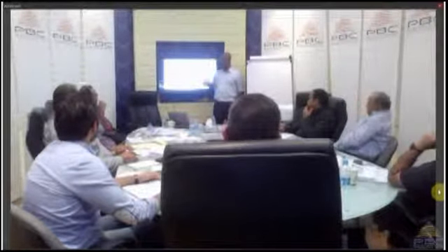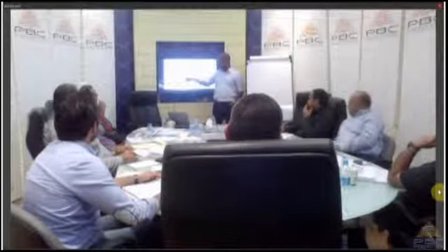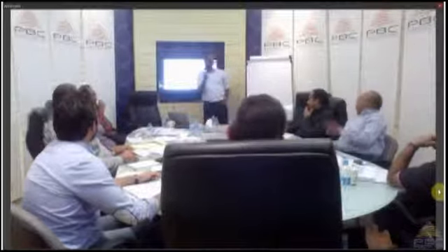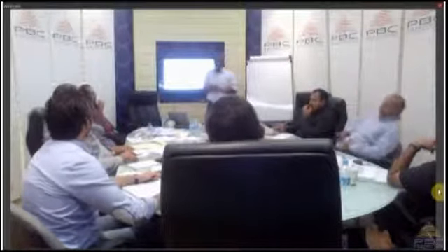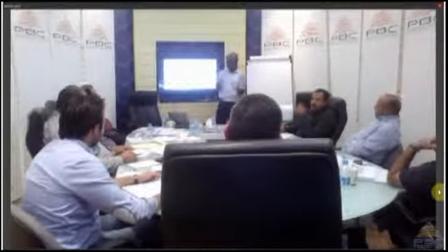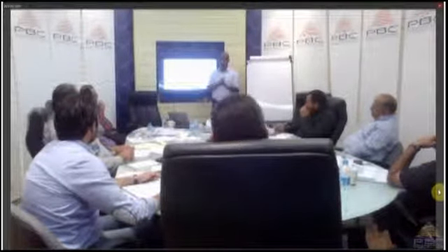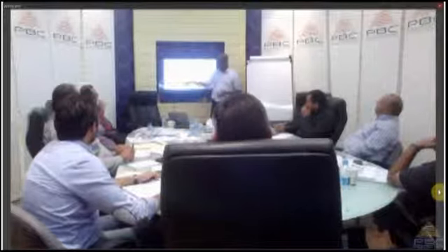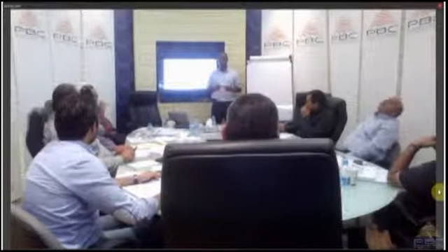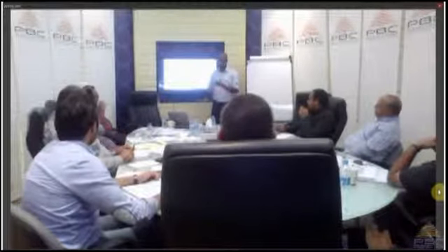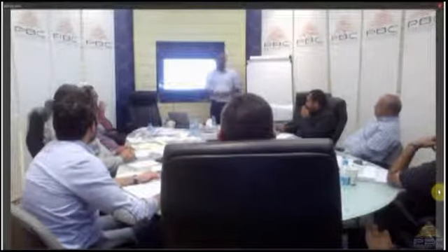Quality planning? Prevention. Design reviews? Well, it depends on how you understand the term: review after, during, or before. Vendor survey? Appraisal. Scrap or rejects? Failure, definitely. Process improvement? Prevention. Loss of contract?